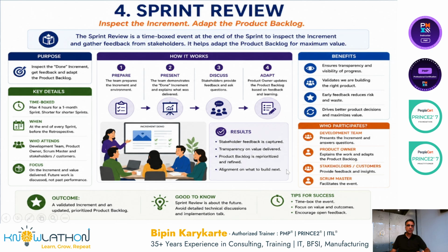So now if there is any feedback which is supposed to take precedence over what is already there in the backlog, it will be added to the backlog and it will be expedited, so that those feedback items will come at the top of the product backlog and other items will be pushed down, right? I always like to give an analogy from the restaurant.